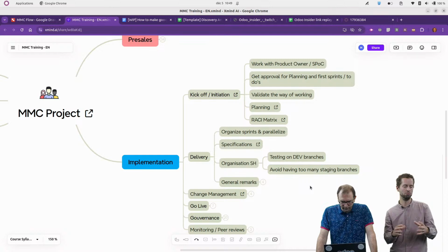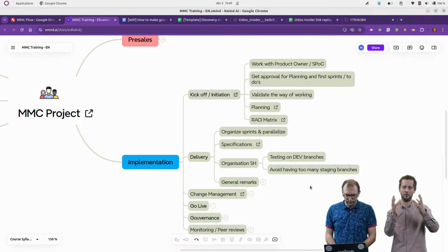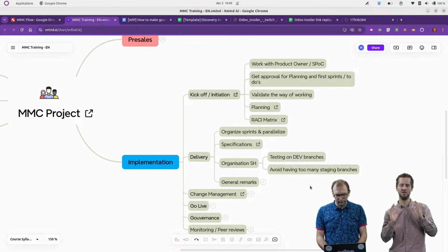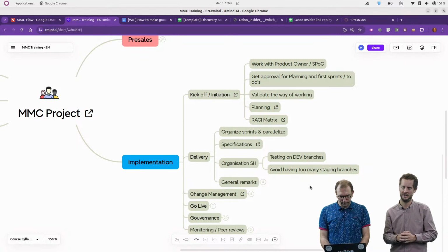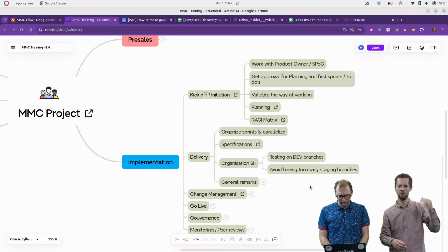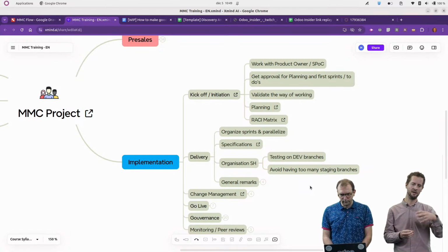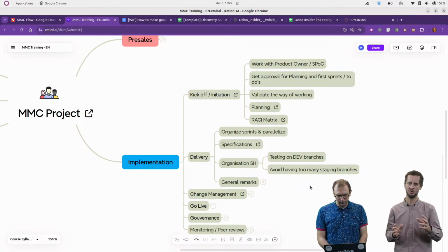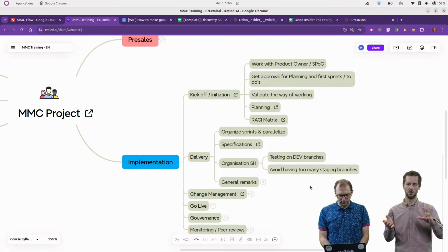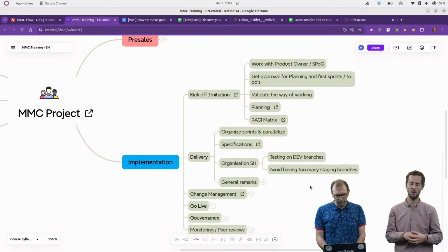Let's say you want to customize the sales order, then you put every modification you want to make inside this Excalidraw row, and try to have something quite big in order to give enough work for a developer to work for several days, and not having to switch from one task that takes 2 hours to another that takes 2 hours, where the developer always has to seek for work, and we lose some time in this context switch because he has to read the task, understand what he is expected to do, etc.